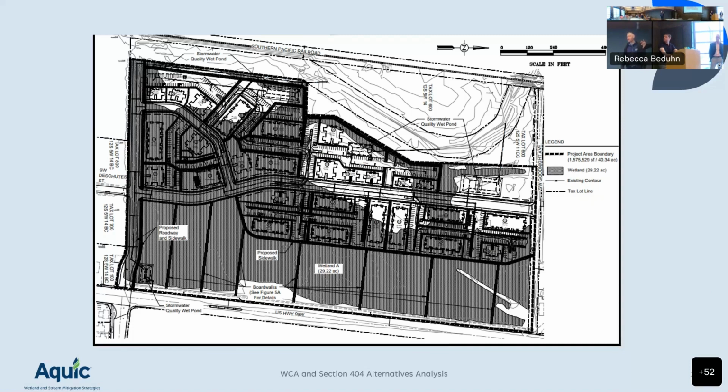And really then diving into some of the details and getting critical about it. Like, for example, how many new units do you actually need here? You gotta lay that out. Yeah, very clearly define why you need this many units. And remember, economic considerations alone don't rule out an alternative.